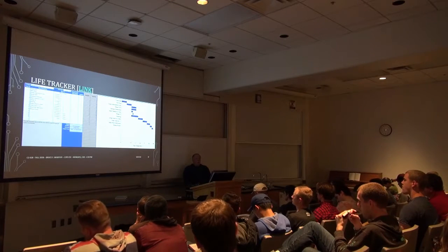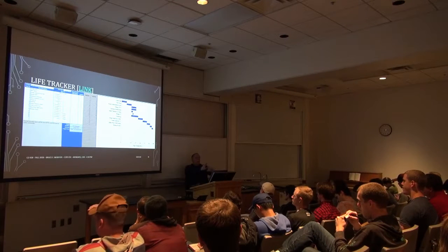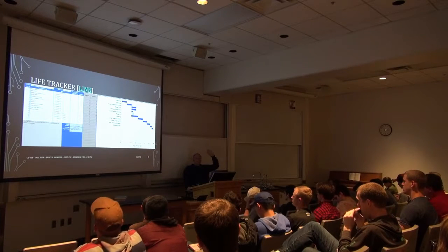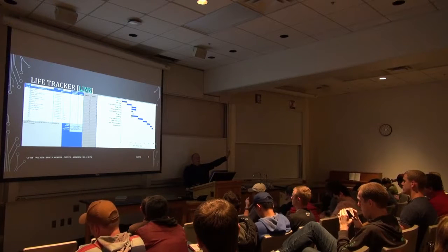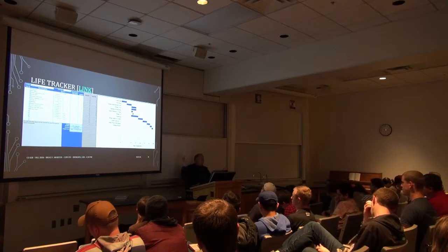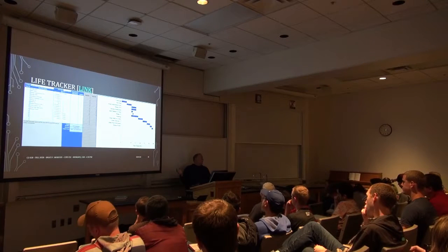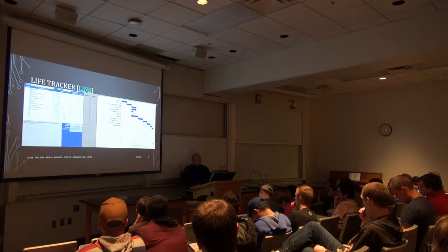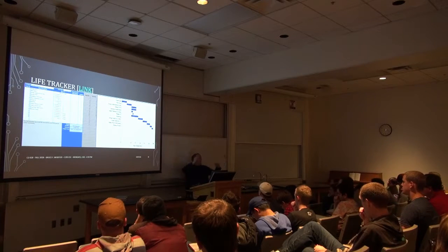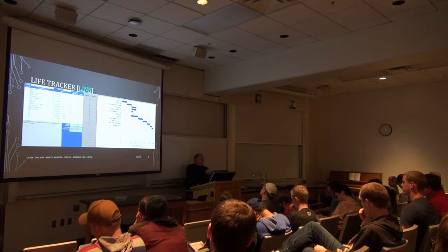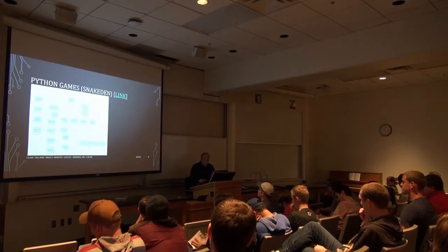The problem you'll face with management is when you do scale your project, it's like, okay, we're just going to do this, this, and this, and we'll get this done in time. Management will see that and will say, great, now do it over again. My daughter Crystal has gone through the exact same thing at work, where they got something new up and running, and they waved their hands and said, look, this is not scalable the way we built it. We need to go back and redo the whole database back end and so on. And management's response was, okay, now we want you to expand this to 5 times the current customer base. They said, no, we have to rebuild, we have to redo the database architecture. Oh, no, you got it all done. Just make it support 5 times as many customers now. It can't. This was built for a specific target base, and it was built very badly because you wanted it on time. So yeah, it's great to build slack into your schedule.